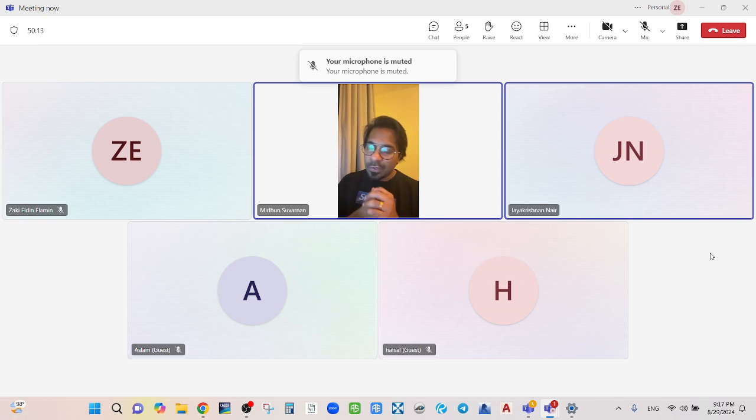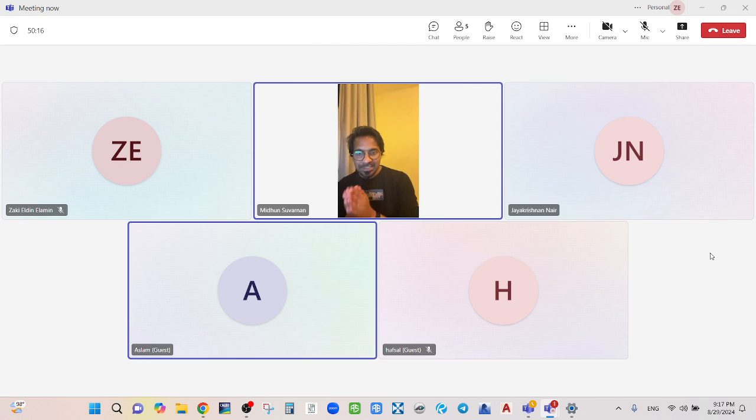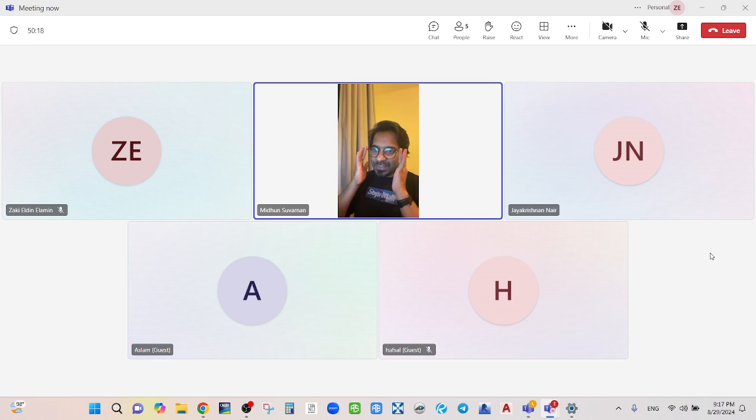Yes. Clear. For all the other guarantees, guys, the principle is the same, but the function is different actually. So let's start with the tender guarantee. Tender bond is the first bond or guarantee which you will come across. Usually for a tender bond, I've seen percentage and I've also seen a fixed amount, but I will never recommend a percentage because that will impact your bid.